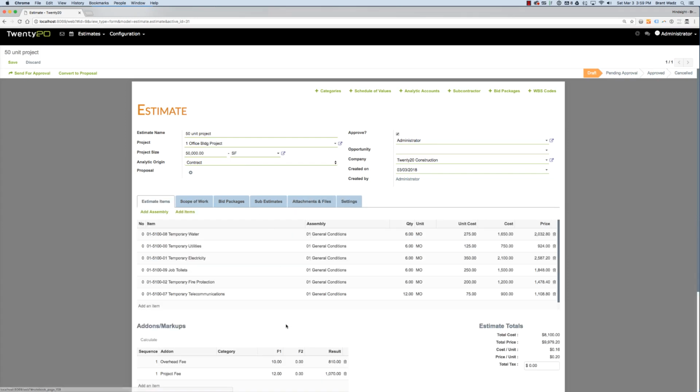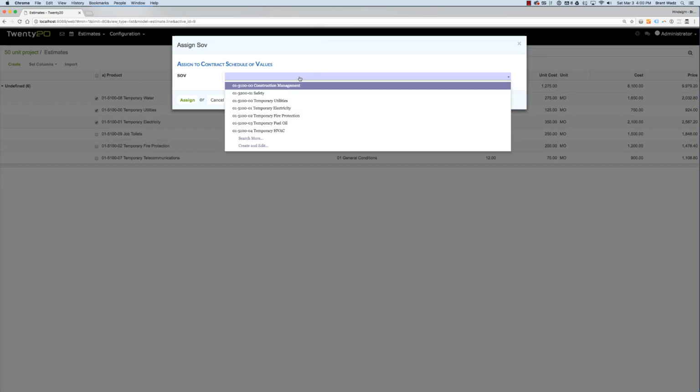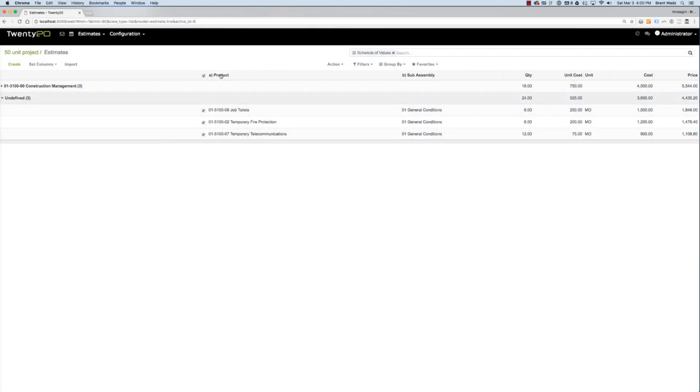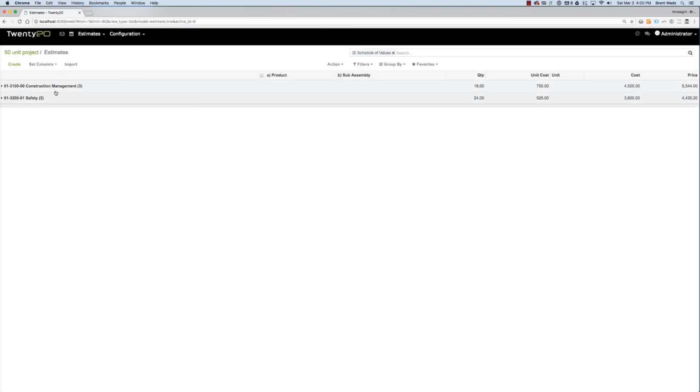So now that our estimate is all ready to go, we have all of our categories associated. We want to create a proposal. So in order to do that, we need to associate the items in our estimate to scheduler values. And I'm not going to be real picky in this video. I'm just simply going to click the first three here, and I'm going to assign them to an SOV. And here's the list of my contract items. I'm just going to pick any one here for this quick demo. And then I have three more that have not been assigned, so I'm going to select them all and add them to another one and assign. So now I have 2 contract items that will show up on my proposal: the quantities, the cost, and the price.